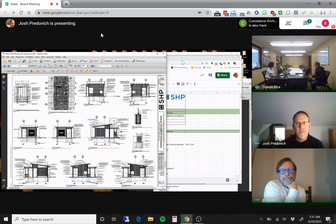So these alternates, this is just what we can pick and choose. Well, that's part of the bid package. We're not talking about playground equipment yet, and we're not talking about servicing. We're going to talk about that in part 2. Your choices here will determine who actually receives this bid. Is it going to be Surgent? Is it going to be Wolf Creek? Quite honestly, if you choose to accept all the alternates, Wolf Creek is going to get the bid. If you choose to pick and choose, we'll have to add up, but it's likely that if you said no alternates, Surgent is your low bidder.